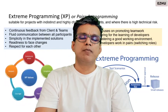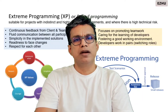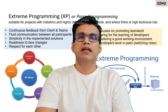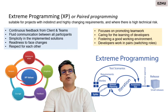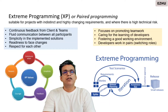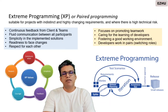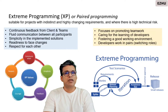Scrum framework may not be suitable for projects where the customer requirements keep changing, the volatility is very high with respect to the needs of the customer, and there is a huge technical risk. In such scenarios, the Extreme Programming framework is more suitable. Extreme Programming values include continuous feedback from clients and across all teams, simplicity of the solutions being implemented, readiness and courage to address any changes, and respect for each other. These are the core Extreme Programming values.